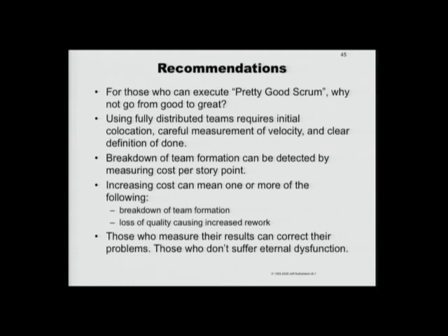You might want to measure cost per story point, and increasing cost will show you something's breaking down or quality is causing rework. And the lesson in all this is if you can carefully measure results, you can very quickly correct problems. Those who can't suffer eternal dysfunction.